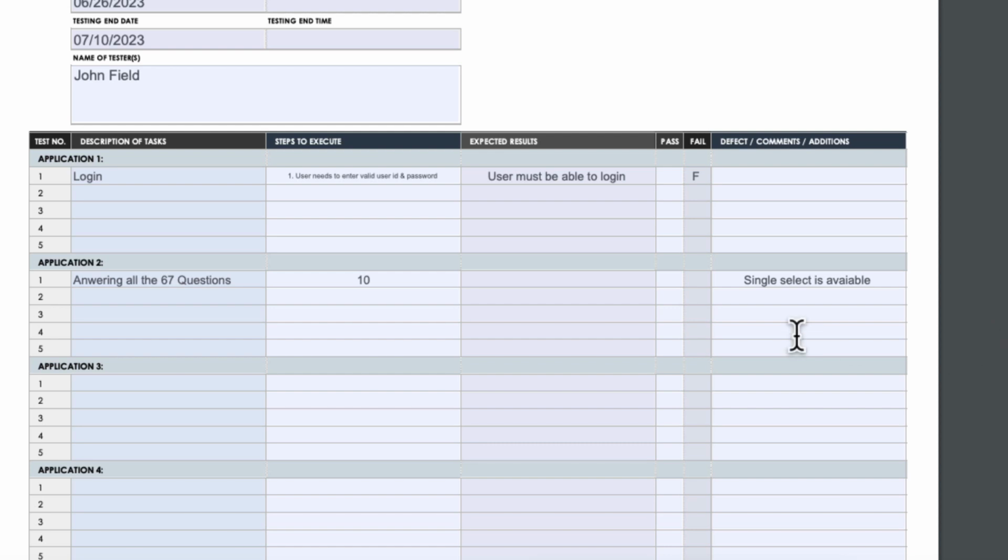And what you will do is, once they create a defect, if everything is a pass, then there's no problem, they're giving you a sign off. But if there is a defect, or bug, we can say anything, what you have to do is create a defect and make sure that it is being tracked, and that the defect is resolved. Unless and until all the scenarios pass, only then can we get the approval. Also, there are three types of defects: P0, P1 and P2.